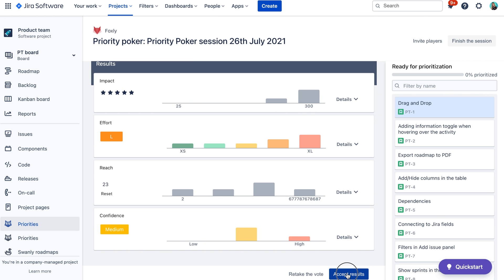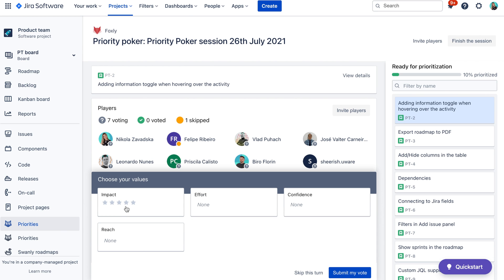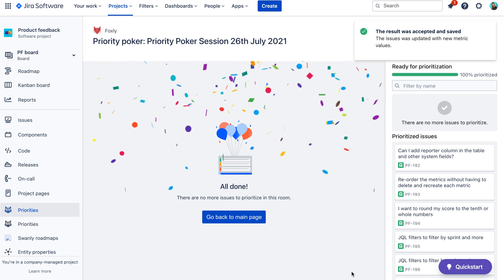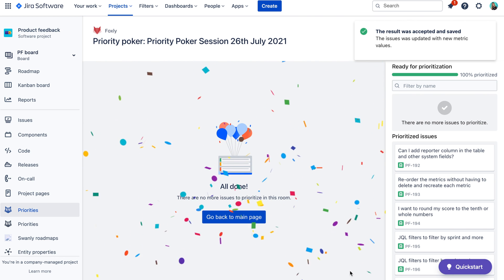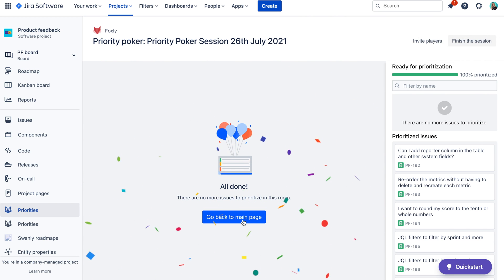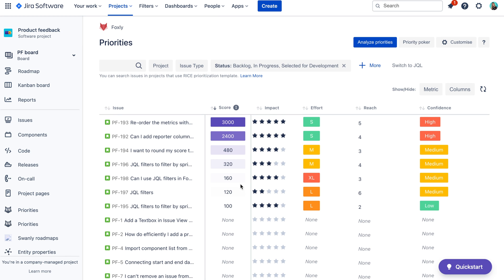After you accept the votes, the result is saved in Foxly and you are taken to the next issue. The whole process starts again until you run out of issues for prioritization. When you finish prioritizing your backlog, you can go back to Foxly to see newly prioritized tasks and sort them by the priority score to see the most impactful ones at the top.